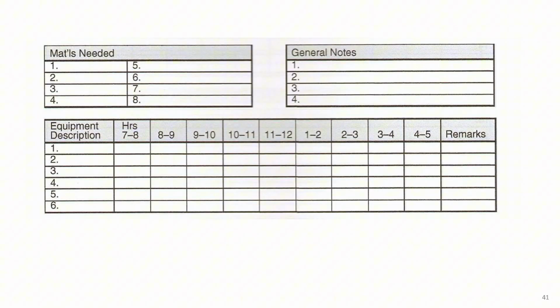You can also build daily plans based on specific needs like materials or equipment usage. In some cases, equipment planning can go down to an hour-by-hour schedule. That way, we know exactly when during the day each piece of equipment is needed and by which crew. This helps prevent conflicts, like two teams trying to use the same crane at the same time.